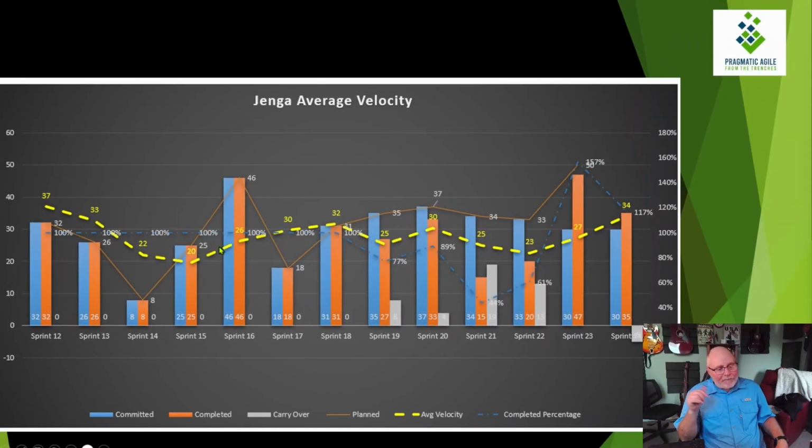Oh, what we discovered was the team and the Scrum Master were tinkering around with some processes that changed the way that the ALM recorded the points. They discovered that if you pulled stories out at the end of the sprint, before the sprint closed, and you just pushed them in the next sprint before you closed the sprint, then for some reason the ALM showed that, if all you had left in there was complete stories, then you were 100% successful. It was not treating the original stories that were in there that didn't get completed. It wasn't counting them into the metrics.